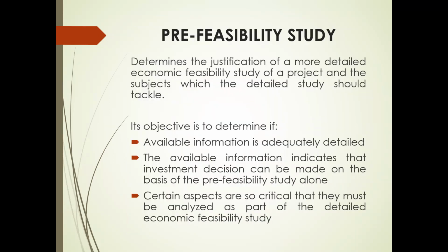So first is the pre-feasibility study. A pre-feasibility study determines the justification of a more detailed economic feasibility study of a project and the subjects which the detailed study should tackle. So the 4 principal objectives of a pre-feasibility study are to determine whether the available information is adequately detailed to show that the project will not be viable or will not be attractive to investors or lenders.